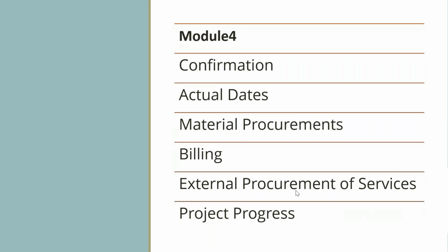Say for example, if an important material is delayed, and manpower is already there waiting for it, just imagine if it gets delayed by 10 or 15 days. The site can't work, they need to have that material. They'll do some other work here and there, but it's a loss for the company, isn't it? So correct planning of all this is very important.